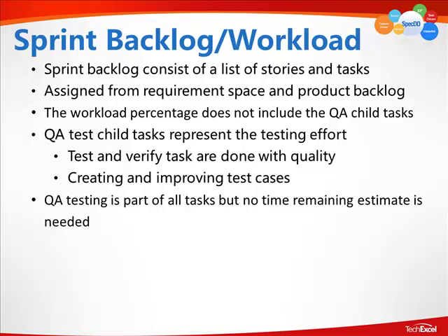So this testing done by all these QA floaters, it's part of all the tasks, it's listed here, but there is no time remaining estimate needed. The time remaining for a QA floater task, again, is not written down, it's not recorded anywhere, and it does not add on to the time remaining that we use to calculate the burn down reports. So the workload of these QA floaters is not included in the sprint percentage.